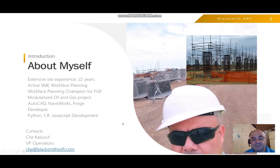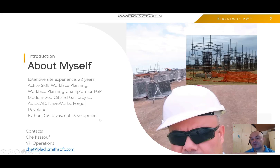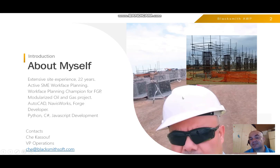In the picture you see what happens when Workface Planning is misused — it gets used to optimize a management requirement that is not in line with the project requirement. In some projects they decided to cast the pedestal but keep away the pier, which later required a bunch of scaffolding, lots of formwork, and delayed the whole project.